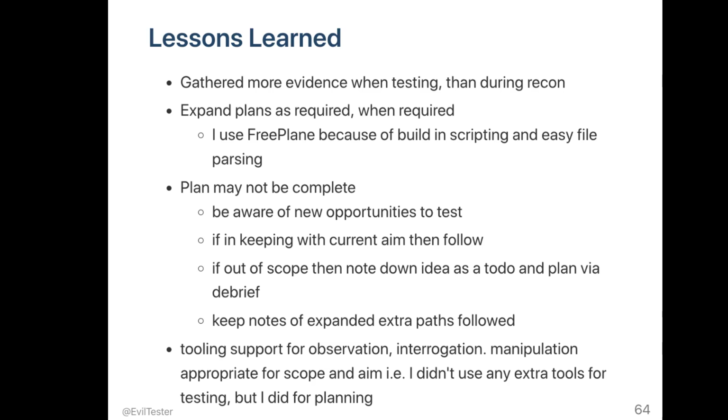Now, plans may not be complete. Plans are unlikely to be complete because we won't have thought through everything. So we have to be aware of new opportunities to follow. Now, with a coverage session, I follow them if they are within the scope of the coverage, if they are areas that I missed in the planning. If it's more of an out of scope idea, then I'm unlikely to follow it. I'm likely to add it down as a note or a to-do or an idea and feed it into a planning session via a debrief. But what I do is I keep notes of the extra things that I do, so it's obvious in my notes for the debrief that we expanded the plan.